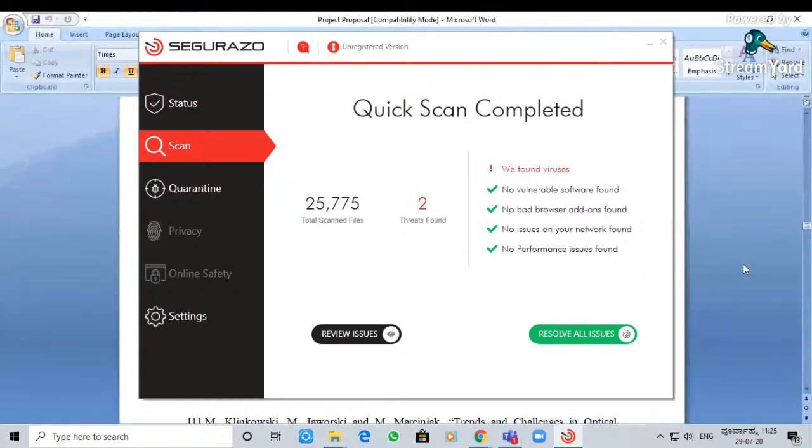Someone who's writing the proposal can look for salaries and wages if you are trying to hire any research associates, the senior research fellow or junior research fellow. So back in 2013, we went with 20 to 22,000 per month in the initial 2 years, and increased to 24, 25,000 for the third year. Now, of course, this salary is much higher in 2020.